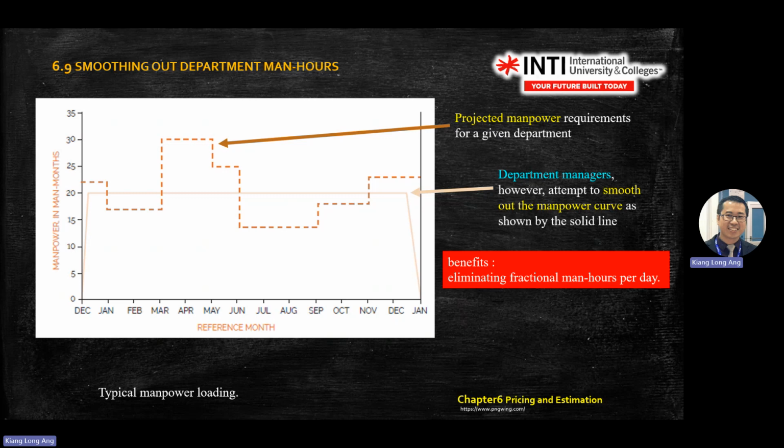You have 2 more staff extra, and your staff will feel very relaxed during this period. So you need to be smart enough to maybe send the 2 staff for training so that they are equipped for the next project coming in. Maybe they need the skill set over here. So at this stage you can send them for training.